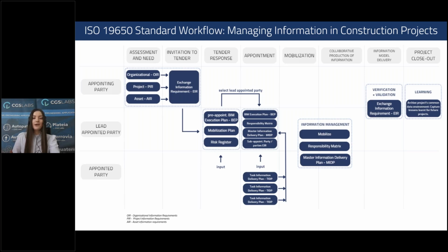Prospective lead appointed parties respond by answering questions and completing a pre-appointment BIM execution plan. We can also call it the pre-BIM execution plan, and also a mobilization plan. The client reviews these responses and makes an appointment for a lead appointed party. So this marks the completion of the appointment step.